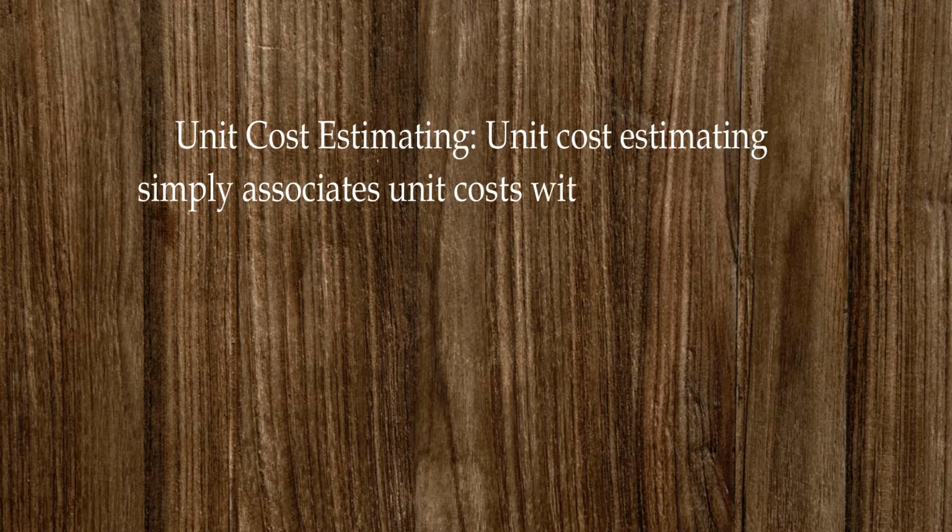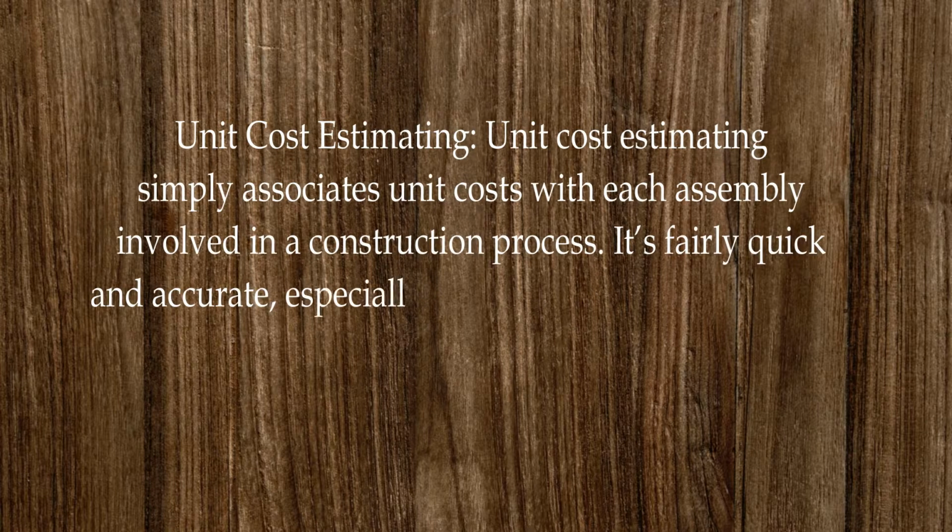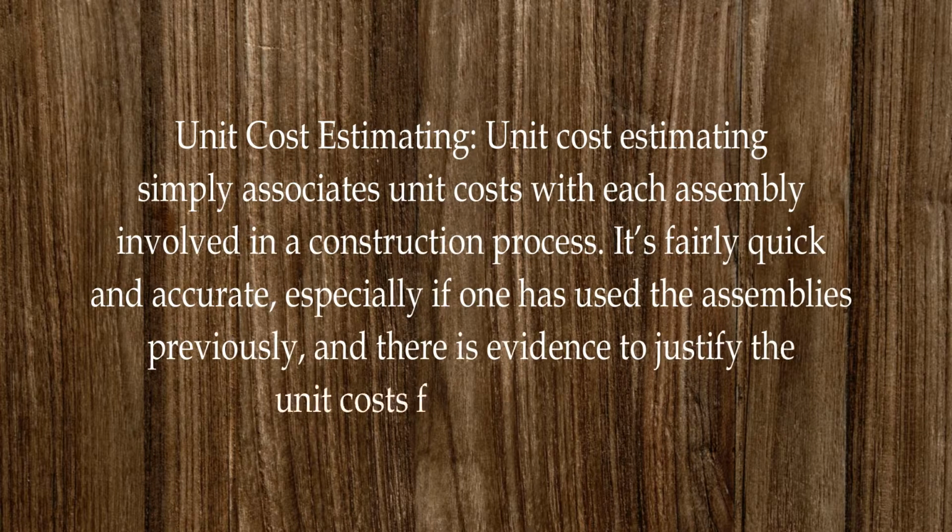Unit cost estimating. Unit cost estimating simply associates unit costs with each assembly involved in a construction process. It's fairly quick and accurate, especially if one has used the assemblies previously, and there is evidence to justify the unit costs for each assembly.